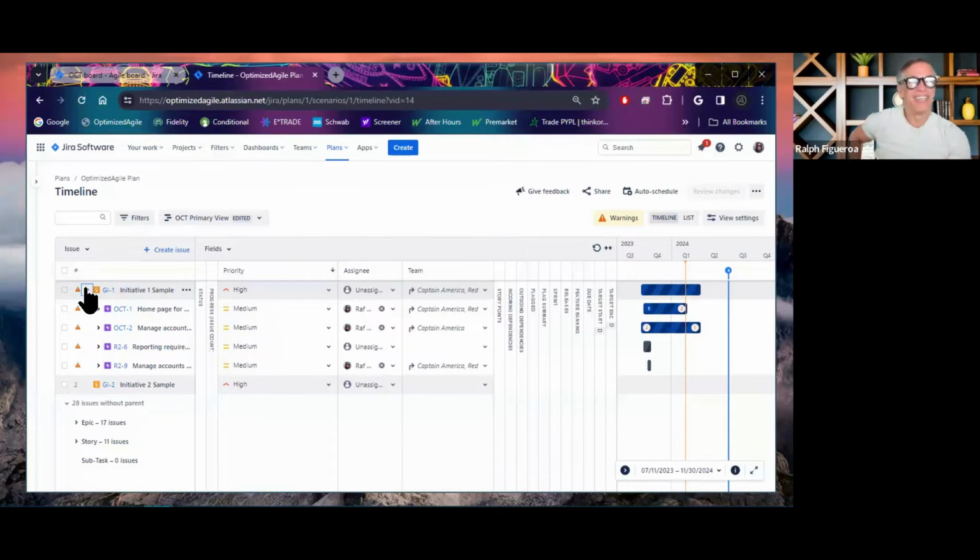Sometimes OKRs are very team execution specific, and there are OKRs which are organizational specific aspirational goals. And so that will be one way of mapping those OKRs or documents, as in specification documents that are at the higher level, into those higher level issue types, and keep them out of the noise of sprints or any activity that occurs every 2 weeks, because they don't get done in every 2 weeks necessarily.